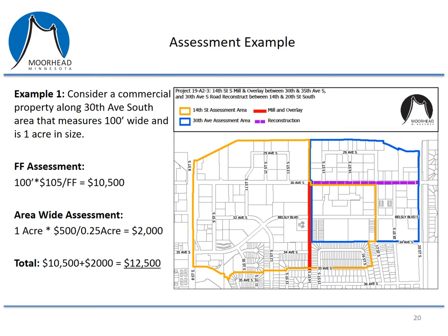For the first example, we can take a commercial property that is 100 feet wide, is one acre in total lot size, and is adjacent to 30th Avenue South, which is being reconstructed. The front footage assessment would be 100 feet multiplied by the reconstruction rate of $105 per front foot, for a total of $10,500. This property would also receive an area-wide assessment — it's a one-acre lot, so $500 per quarter acre means the area-wide assessment for 30th Avenue would be $2,000. The total assessment in this example would be $12,500.